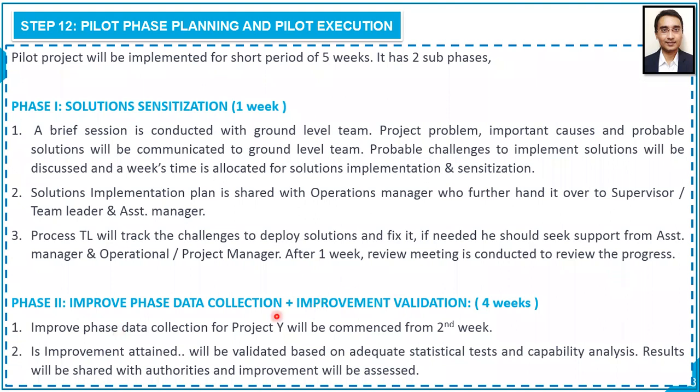Phase two, improve phase data collection plus improvement validation. It will take 4 weeks. So we started with solution sensitization for 1 week, and that's phase one. Now phase two, improve phase data collection plus improvement validation, for 4 weeks. So improve phase data collection for project Y will commence from the second week. Is improvement attained? It will be validated based on adequate statistical tests and capability analysis. Results will be shared with authorities and improvement will be assessed.